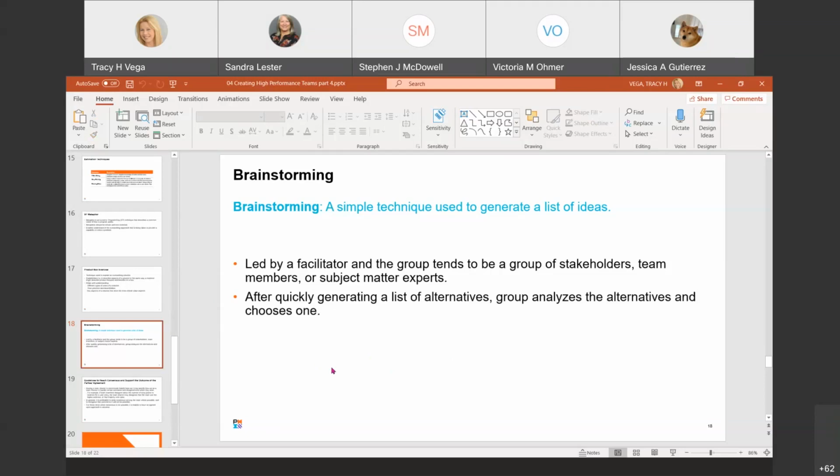So, guidelines to reach a consensus and support the outcome of the parties' agreement. The techniques covered in this topic are useful in helping the teams assess alternatives and make decisions with some specific guidelines. We have some specific guidelines for you to use. Having the team charter is enormously helpful, as it may specify how the team chooses to handle certain scenarios and disagreements that arise. For example, team members may disagree about the number of story points to estimate for a particular story. The team charter may designate that the team will use a higher estimate or a majority vote rule.